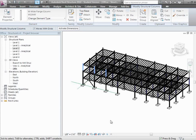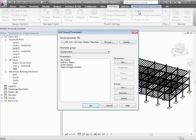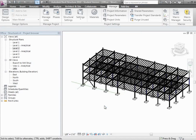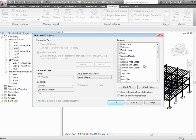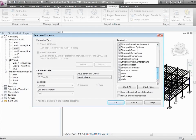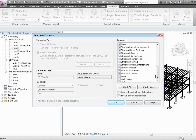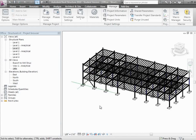The big trick with all this is go to Manage. Set yourself up with a shared parameter that gives you the ability to do the mapping the way you want it. Set up some sort of task ID. Add some value where you need it. For project parameters, associate that with the elements you want to be able to associate that with. But start taking control of your data. You're allowed to add as much data as you want to. It's your data, so make your life easier for how you need to model things. Don't just settle with what comes out of the box.